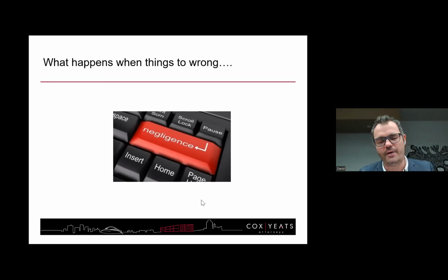And people often say, oh, but PROXA is the golden standard for engineering procurement. That's nonsense. That's just not the truth. PROXA is one that people often go to. The PROXA standard, I think, is 2 times the fee, but that is getting amended all the time. So that's not the standard. That's not the rule. Please don't believe that's the rule, because it's not. You've got to actually get the contract given to you.